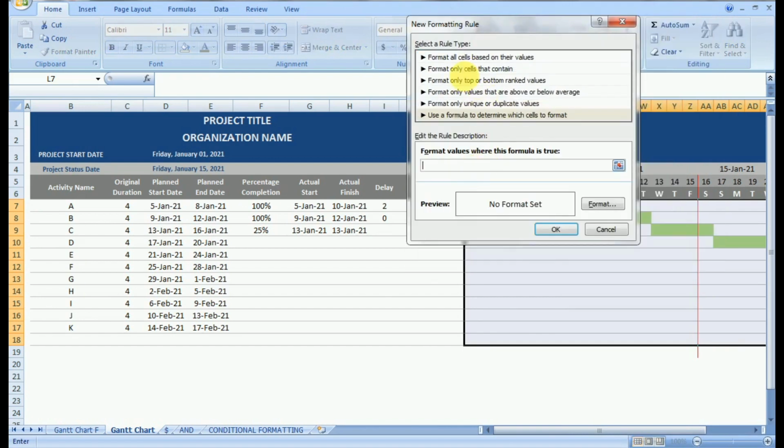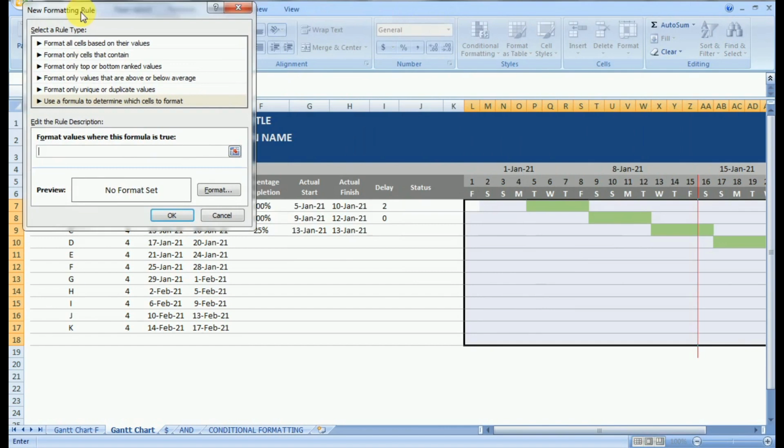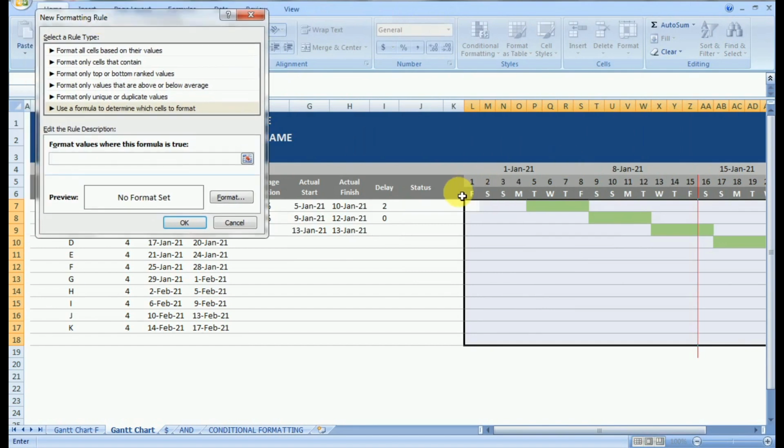Now let us use the formula similarly to how we used it in the previous session so that we get the actual start and actual finish on the bar chart. So our data date, or our time period, or the calendar date: when our calendar date is greater or equal to the start date, that is the first logic. Our calendar date should be greater or equal to start date and should be lesser or equal to finish date. Then my formatting should be there.